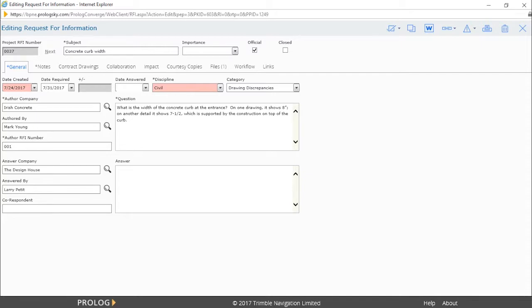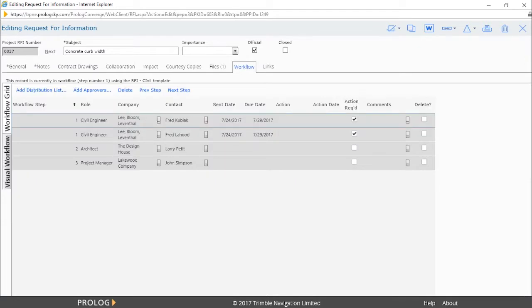The workflow template specifies the number of steps and the approver for each step. The screen shows approvers and the steps they are assigned to, and each step can accommodate more than one approver. The workflow grid tab displays this information in a grid-like format.